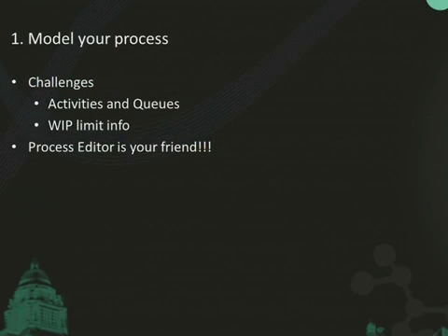The other ways that I thought of when I was talking with people in the product group, the TFS team, we could have used a custom work item type called an activity, and that could have 2 child work items like tasks or stories. You could assign it, but it really doesn't fit into the user interface of TFS. It gets really awkward from a user experience point of view. The state is the natural place to go, because when the developer's working on a user story and he's done, he moves the state to development done, and everyone's happy. So I'm going to show you how to do it with states.